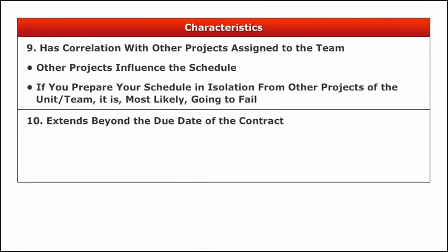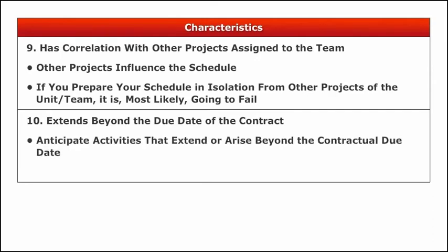10. It extends beyond the due date of the contract. There will always be activities that extend or arise beyond the contractual due date. Your client will want to ask you questions, contractors will call you, and summary meetings will be held. Anticipate these activities and build them into your schedule.